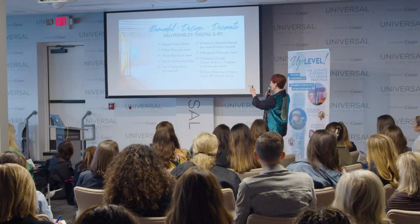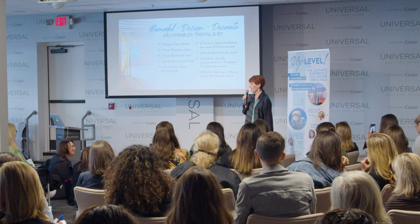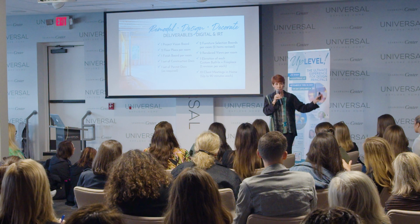Now, this might not look exactly like yours will, but 10 client meetings in the home. Do you see what I did there? Up to 90 minutes each. How many of you have lost a half a day or even a day sometimes with these meetings and you're thinking, I'm going to be gone for 90 minutes. You know, 5 hours later, you're finally back in your office. No. That doesn't have to happen. Now, the first meeting goes over. All right, we let that ride, but we mention it to the client. We mention it to the builder. We mention it to whomever we need to mention it to. If they're going to do it again, change order, additional fees.